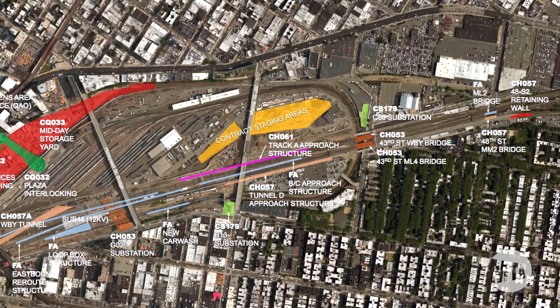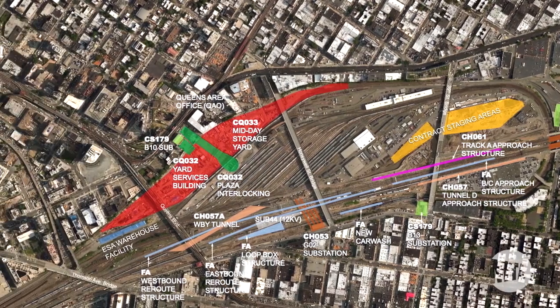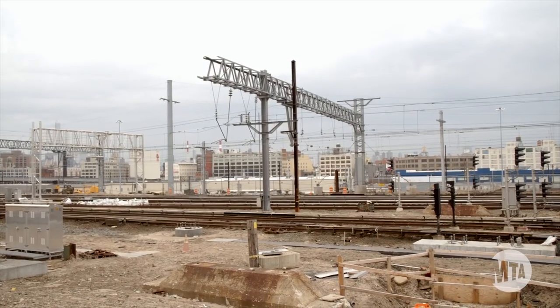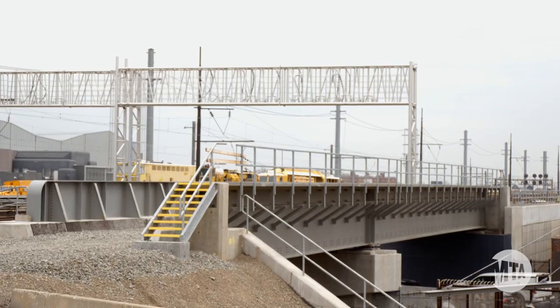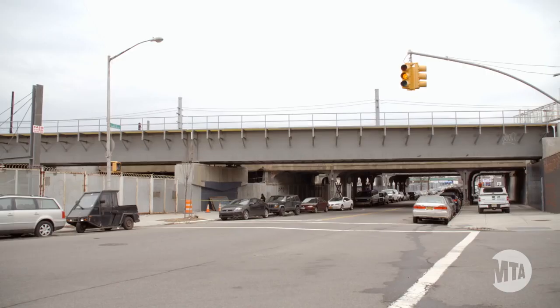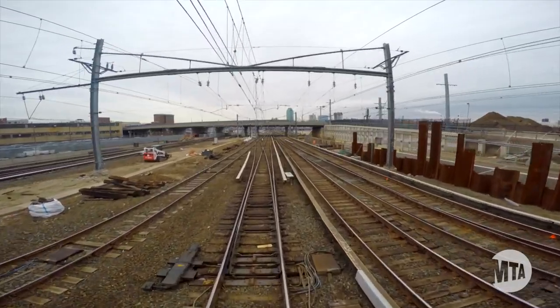Construction in Herald is split up into multiple East Side Access contracts, which organize the scope of work into priorities. We put up about 93 above ground catenary structures. Underground 12 kV is fed to these catenaries, which will power up the pantographs that power up these Amtrak trains. In addition to that, we built some bridges. We're trying to segregate Amtrak and Long Island so that they both have their own paths in and out of the tunnels and with minimal crossings.